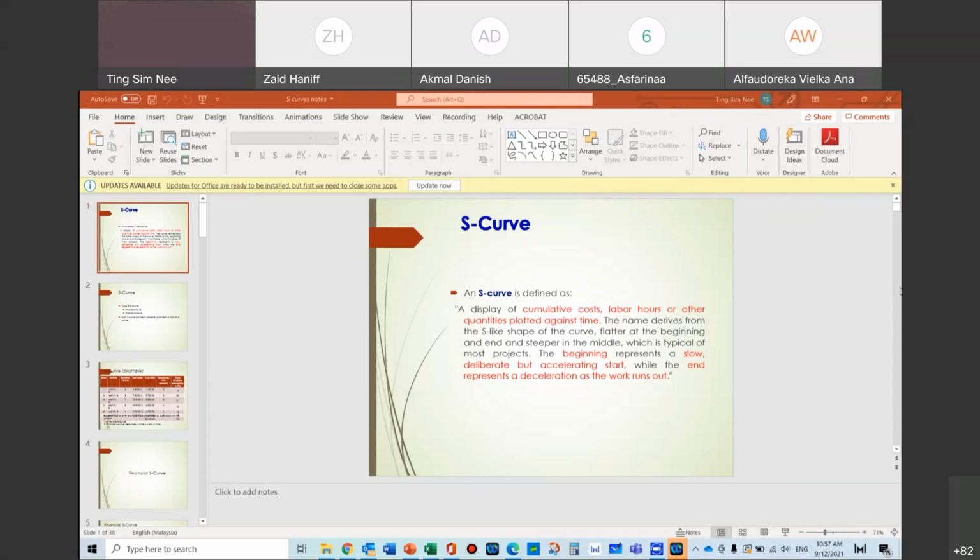So what we will do is key the resources into the resources data sheet. From the resources data sheet, the next step, under normal circumstances, is to do the resources planning, the loading and all that, based on the technique that I taught you the other day. Leveling or smoothing, and then you know the fixed amount of labor on site. Then you go back and tinker with the amount of resources that you have, and double check the numbers that you keyed in, because now with the fixed amount, the numbers may change.